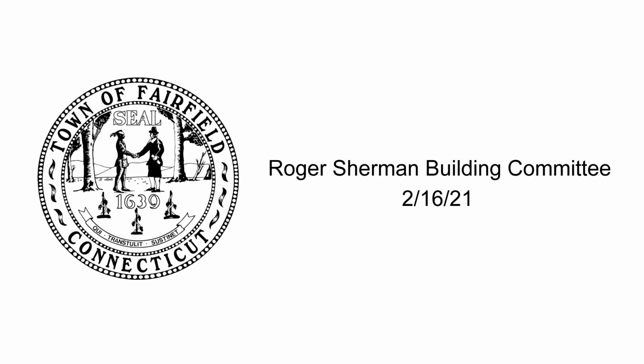The building official and fire marshal were on site last Tuesday, February 2nd. Things went well. They have signed off. The report I got back is they signed off on the project. Diversity is still waiting for the official piece of paper, but they are expecting that. So the CO is done.